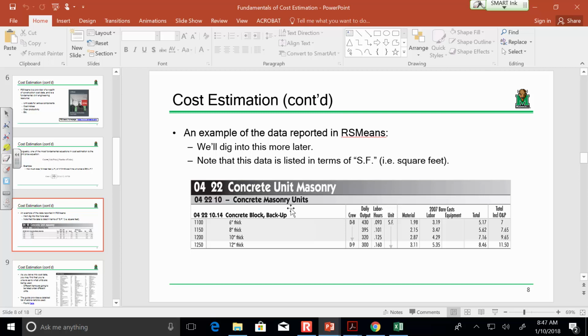Yes, and another thing to point out, I would characterize that as a level 1 estimate versus a level 2 estimate. Level 1, just using the bare costs here. Level 2, trying to get more in depth with the crews. Level 3 is to take those crews and actually start looking at West Virginia labor rates and West Virginia benefits, and an example, which by the way is in here. You can even get that detailed. This is a very valuable and useful guide. I mean, even firms that have all that data probably have a few of these on file.